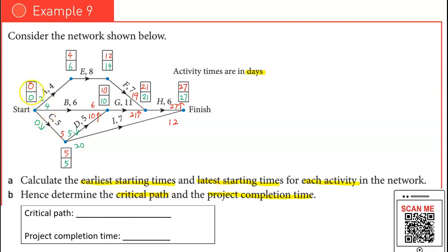Now, from here, you know that your calculation is definitely correct. How do you know that the process is actually correct? At the first starting point, your LST value must always be 0. If you have a problem finding 0, that means you have made some miscalculation along the way. Now let's write down the critical path here.